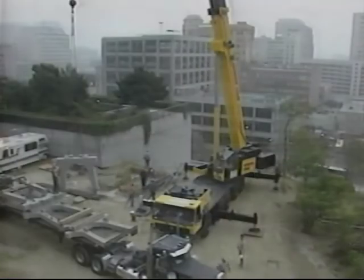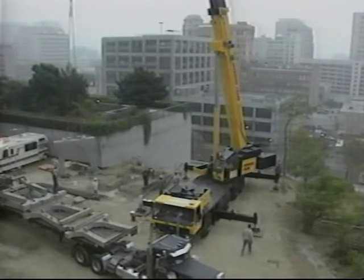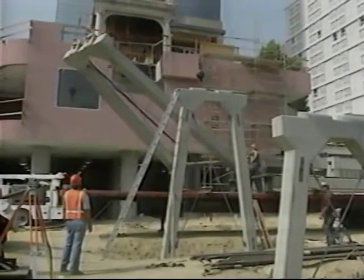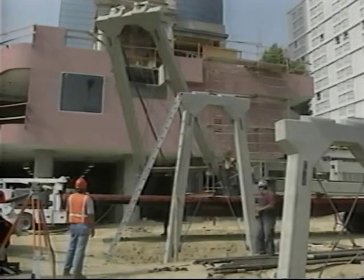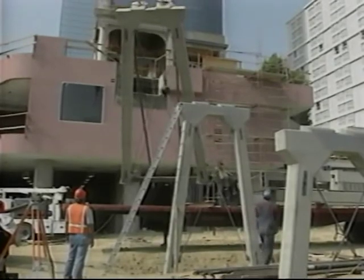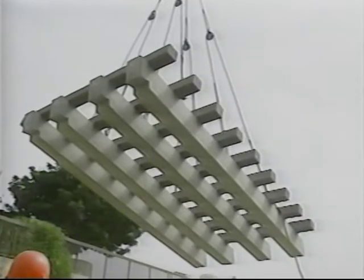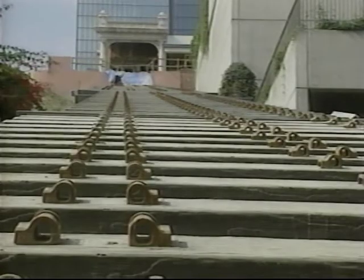On October 11th, the installation of the track support members began. These supports vary in height, depending upon where on the hillside they are to be placed. Formed of concrete and designed to resemble the original structure, they will span the distance up the hillside. Placed on top of the supports is a prefabricated cross member upon which the tracks will be attached. At the end of the day, Angel's Flight begins to look like a railroad.